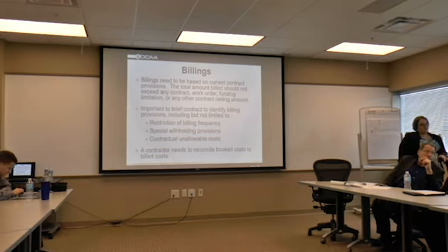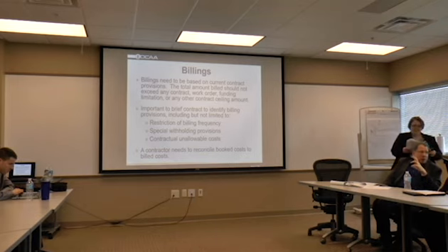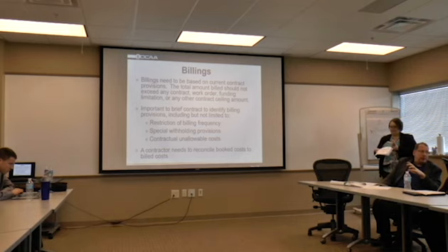Well, I've not specifically seen the billing frequency, but I've never looked for it because I never knew it was going to be in there. I think currently the standard, what we're seeing in many cases, is not more frequently than every 2 weeks. Generally, there is some contract verbiage that explicitly states that.